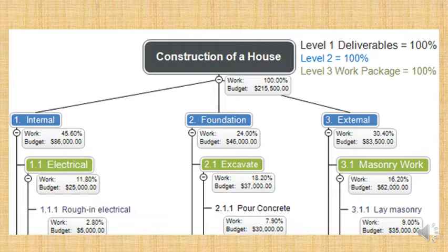Those smaller work packages, you can see they've actually got a percentage there, and that's probably the percentage of time spent on the work package in accordance with the entire work that needs to be done with the project. Often in civil engineering, I'll have to say I don't usually do it as a percentage. I actually assign a quantity, how much time needs to be spent in terms of man hours.